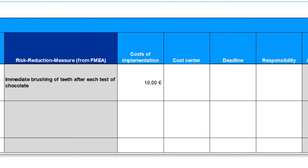Now we can estimate the costs of implementation. To secure financing, we propose a cost center to be used for the billing of expenses. In the last steps we suggest a responsible person for the measure and determine a deadline to make the implementation binding.